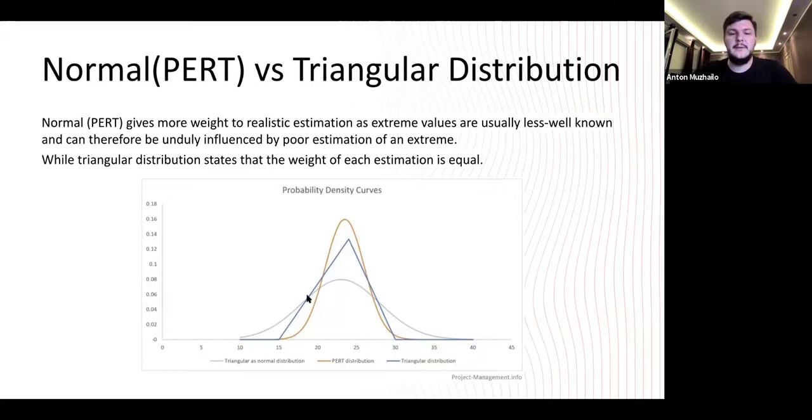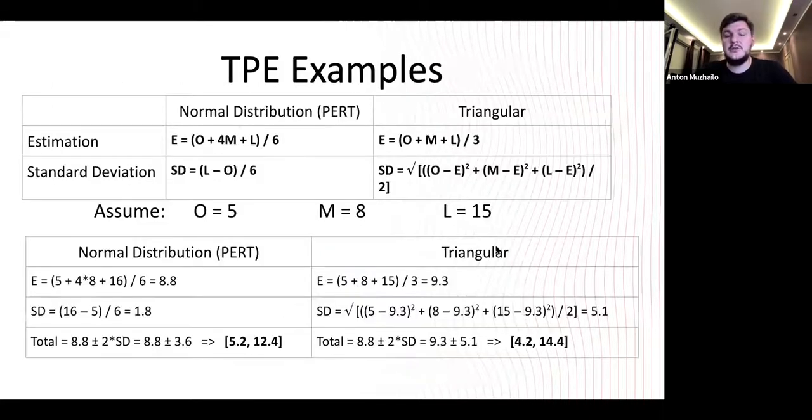I won't go this deep, but just saying that triangular is like safer, but not that precise as normal distribution, which comes to the general rule of thumb: if you need very precise estimation and you have the most data possible to do the estimation, you have to use PERT. If you have very blurry data, like lots of things unknown, uncertain, you should use triangular one.